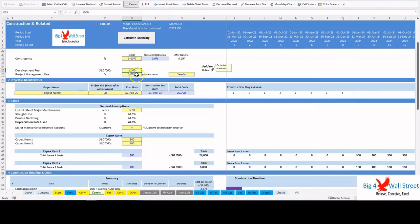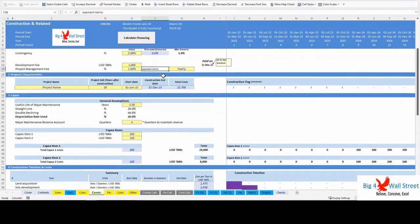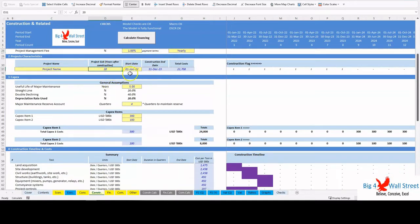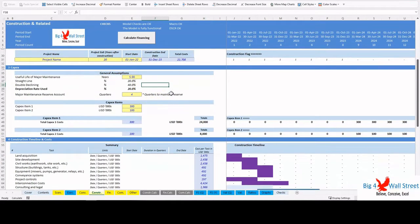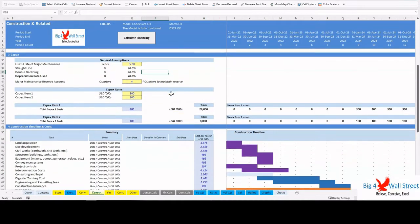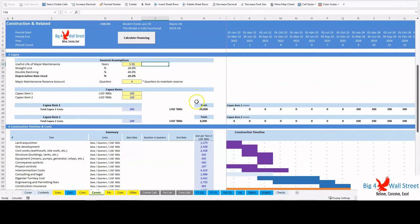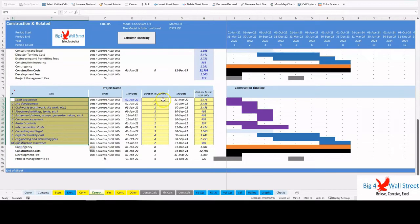Furthermore, the user sets the development fee which is paid when the debt is drawn, the project management fee as a percentage of construction costs (this fee can be paid on an annual or quarterly basis), the project name, the project exit in years after the construction, and the construction start date. Additionally it is possible to set the capex items on a quarterly basis, the needed capex reserve account in terms of quarters and their corresponding useful life. Finally, the user can set the timeline of the construction for each task, their duration in quarters, as well as the cost per task.